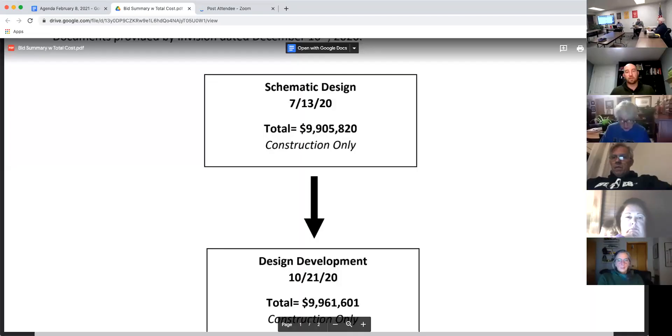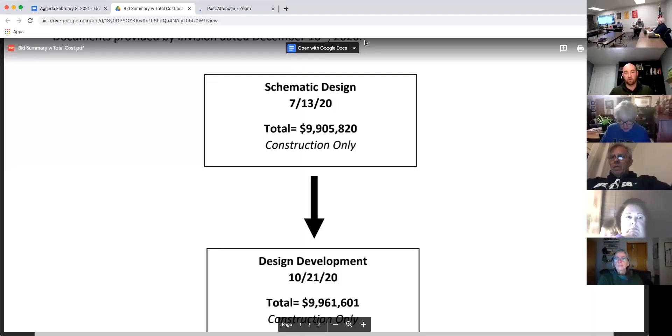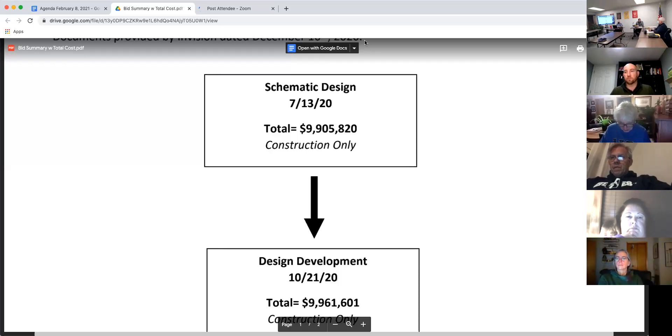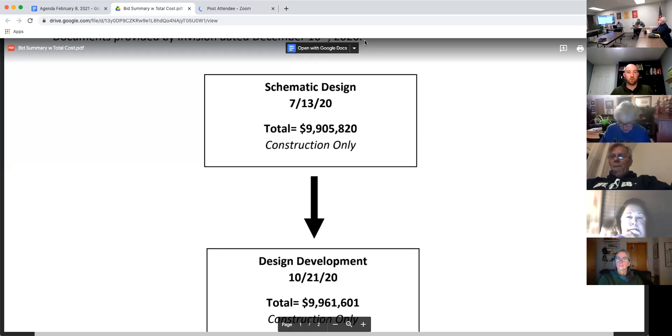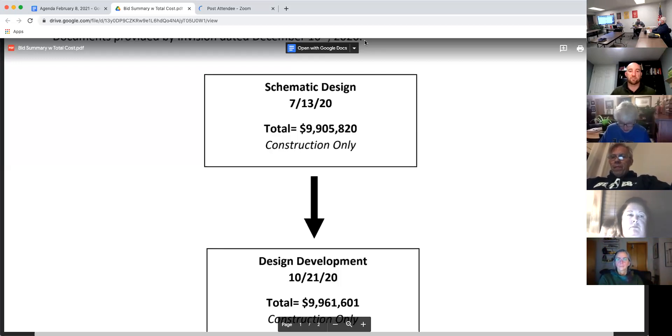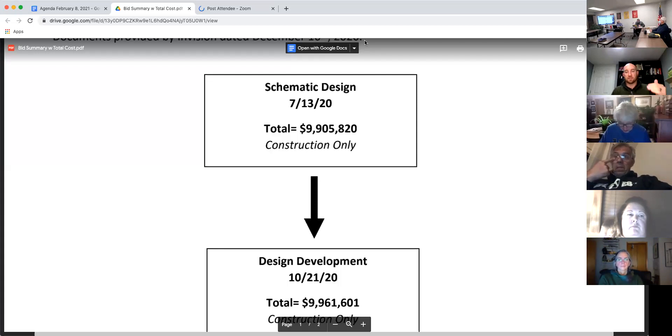As we went further into the fall, there was more discussion with the group. The design was a little more developed. Some things were added into the scope. So at the end of October, we were at $9.96 million. And this is construction numbers only.